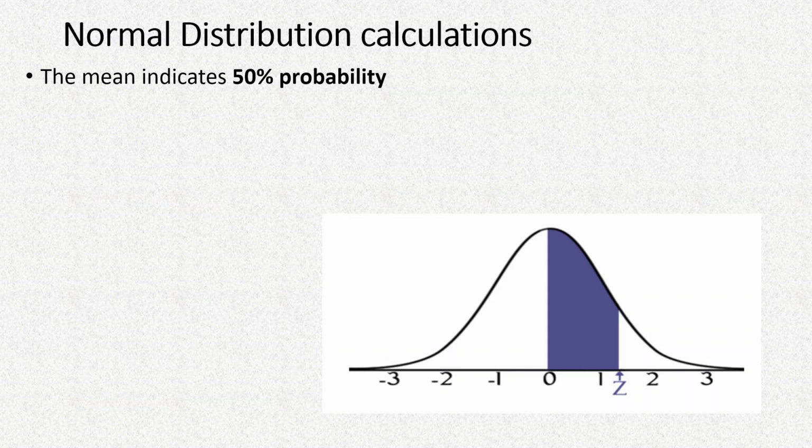Suppose this mean represents 40 days, then our most optimistic estimate was suppose 26 days, and the most pessimistic estimate is, since it is normally distributed, it has to be equally spread out, so it is 54 days.